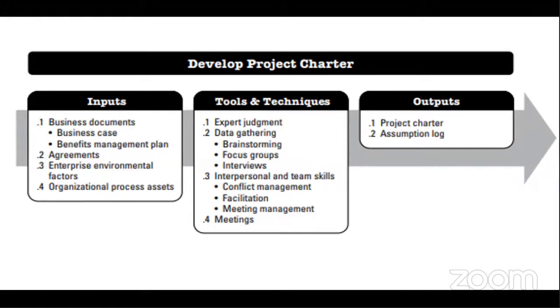Now, I want us to go back to what we did in initiation. One of the steps in initiation is first identifying the problem, then developing a business case. From the business case, we'll undergo a feasibility study. From the feasibility study, we'll have to establish terms of reference. And that terms of reference is what we call a charter.